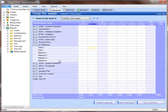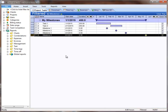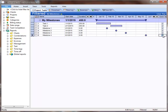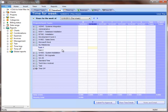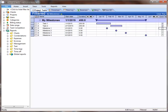Go ahead and click Save and Close and you can see that the Gantt chart has slid out to include that extra time. Going over to the timesheet, you see that Milestone there. Again, Milestones are not something you actually track time to — you track time to tasks. Milestones are more used for just evaluation points; there are sometimes go/no-go decisions. I'm going to go ahead and unselect some of these quick task checkboxes, and when we go over to the timesheet you now see just the tasks. That is a way to hide those Milestones and use them just as evaluation points. You could put a reminder on each one so they pop up for you, allowing you to check your project and make sure that it's on track.